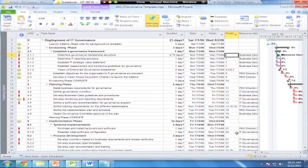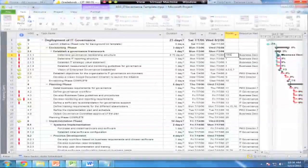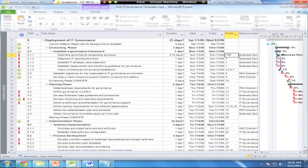If you want to do anything besides finish-to-start, you have to include a code such as FF, FS, or SS at the end of that predecessor relationship. For example, if I wanted this to become a finish-to-finish relationship, I can type in the field — say 1SS for start-to-start. Watch what happens as I press Enter: you'll see this task move on the Gantt chart to show that it's a start-to-start relationship.